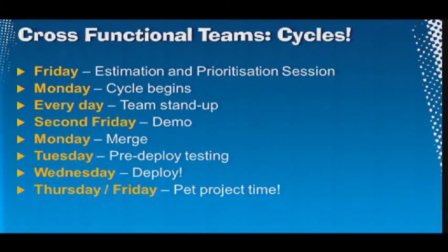We have a debrief for the cycle: what went well, what went wrong, what can we fix for next time. And also then on the Friday, there's the estimation and planning session for the next one. Rinse and repeat.